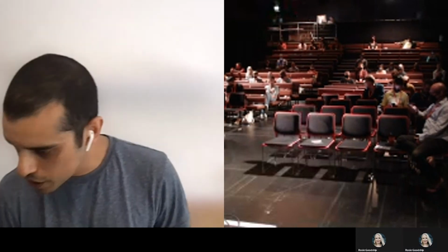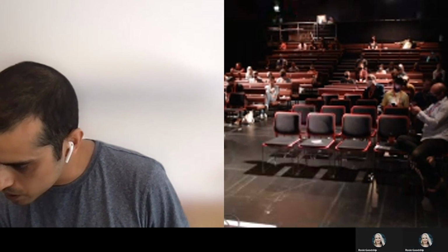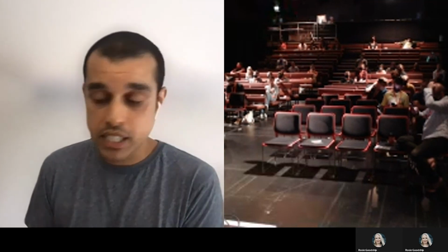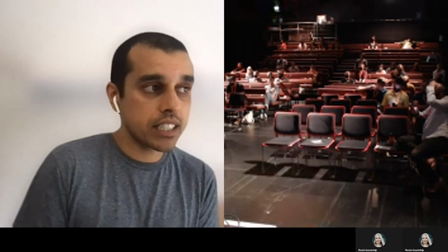Okay, so one of the first questions we've got here is, what would be the best way to communicate this new way of working to a team? Good question. A really interesting way is helping the team understand what's going on with their processes. Why are we trying to improve our way of working? And helping them understand what the theory of constraints is actually doing. I went through it very quickly, but the idea behind theory of constraints is identifying the biggest bottleneck in you getting value out. By measuring your development process, you can figure out where the biggest constraint is. So instead of trying to encourage your team to work in a different way, help them identify where the bottlenecks are and tackle those first.